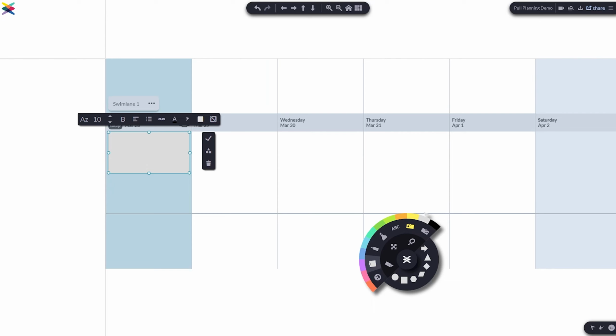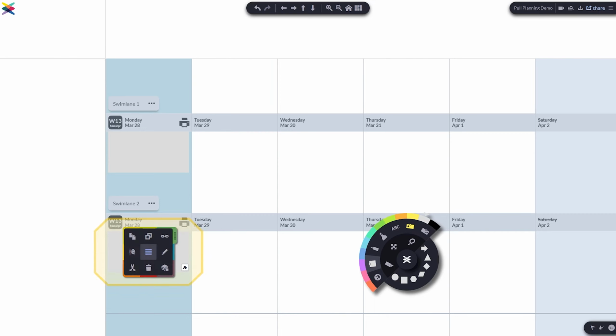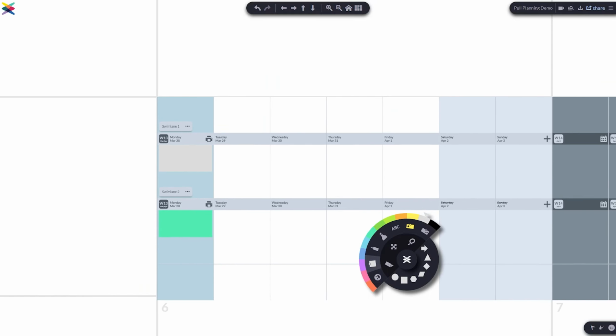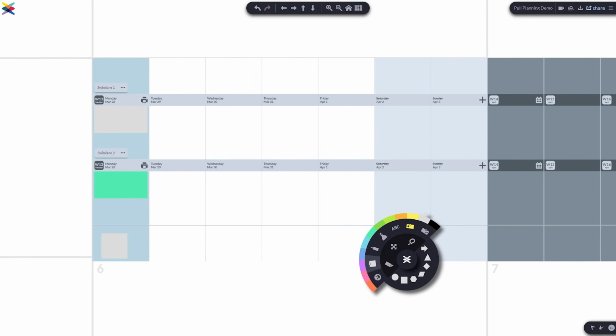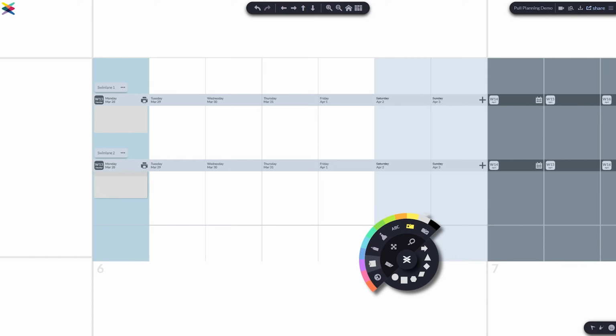Swim lanes are good for breaking up work into specifics, whether that's work on different floors, zones, areas, or different teams. To add a swim lane, simply add content under the break in the plan. Moving everything out will delete it for you. So if you want to establish swim lanes ahead of time, add in labels as placeholders. Now, this is only an admin feature, but you can also add the color and edit the name of the swim lane.